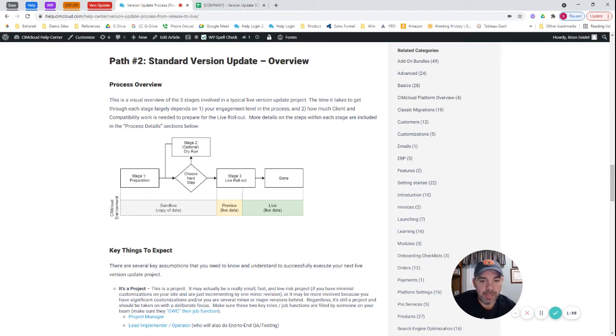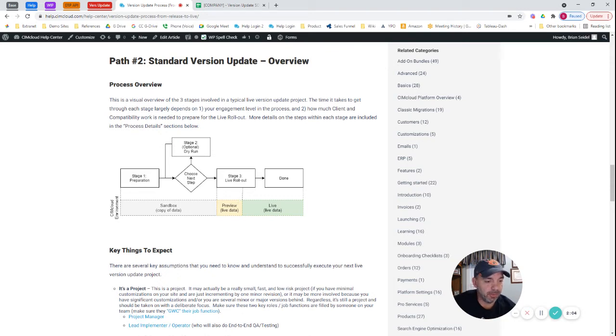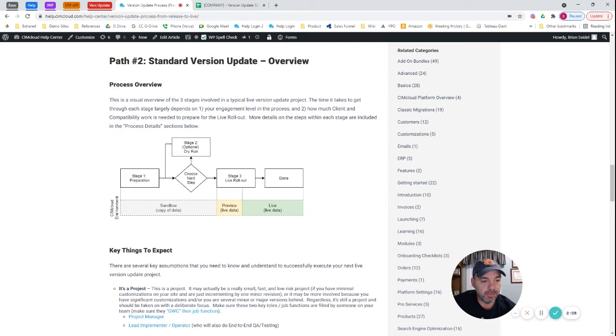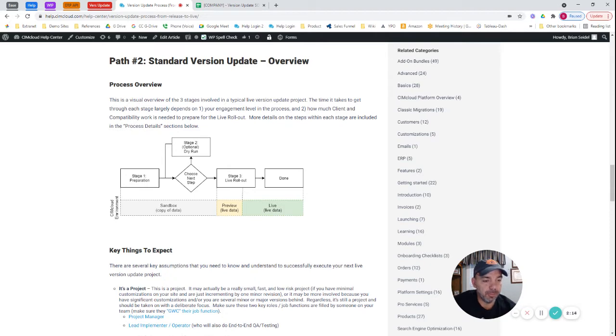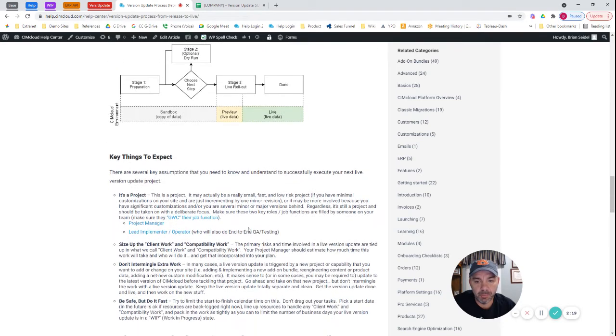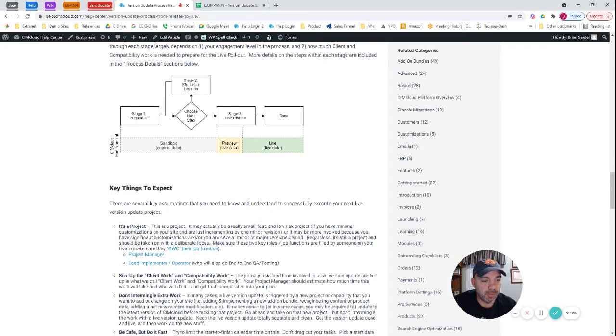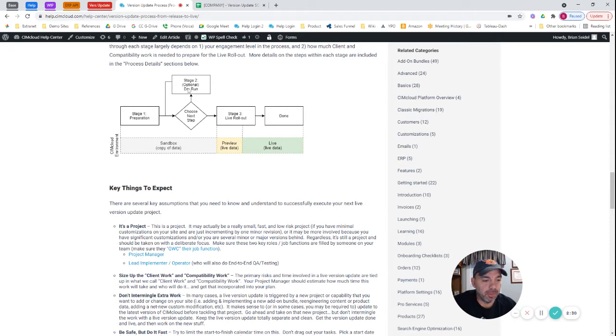That go-live checklist is going to be used during stage three in the live rollout. There is a cutover period where you're going to have a brief outage on your site, and the go-live checklist is where you're taking actions during the publish process with regards to data and or any customization compatibility. There's two bodies of work, explained in this article called Client Work and Compatibility Work. The checklist of that work that has to happen at go-live is the go-live checklist. And the goal is in the preparation stage and the dry run stage, you can nail down this process to minimize the risk of problems during stage three.